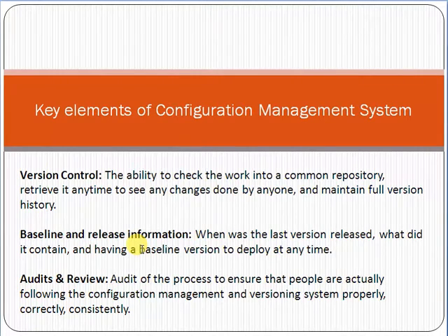So baseline concept is that you can measure the performance of your work, of your project, against the agreed or decided baseline. For example, if the baseline cost was $5,000 and you have completed the work in $6,000, that means you have overrun $1,000, so you were not okay.